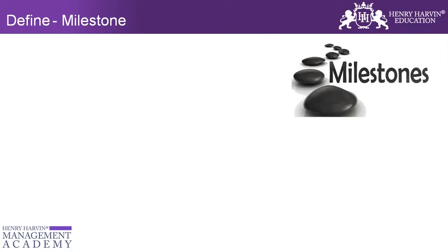In the Measure phase, we are trying to identify the cause of the problem and identify some parameters. The Analyze phase, where we do hypothesis testing, statistical tests, and other studies, takes again two to three weeks. The Improve phase will typically take between four to eight weeks.